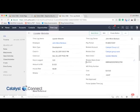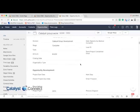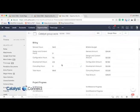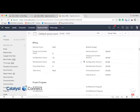All of these time logs are synced back to the opportunity. If I click on the related deal here, I can see a quick summary of the budgeted hours and the actual hours logged for this account. Since I have granular data on every type of work performed — the billable rate and the cost associated with the employee — I'm then able to run very granular reports on a P&L for this particular project based on employee hours or work type to determine efficiency on this job. This also allows for better resource allocation to match employees with the highest skill level to the highest billable work types.